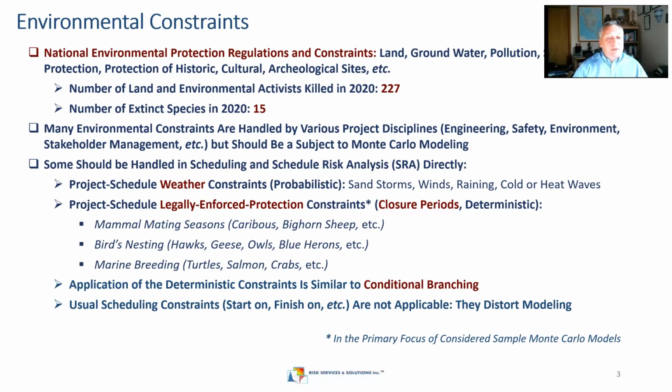Second point, we need to take into account legally enforced protection constraints. We will call them closure periods. They are deterministic. And we need to take into account existing requirements related to mammal mating seasons, bird nesting, marine breeding. Yeah, I had all of those issues in my previous and even in current projects. I heard also about protection of insects like butterflies in some areas of the world. So when you do projects somewhere abroad, you need to learn quickly what those constraints are.